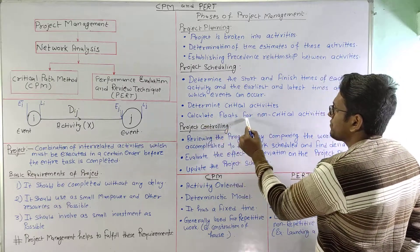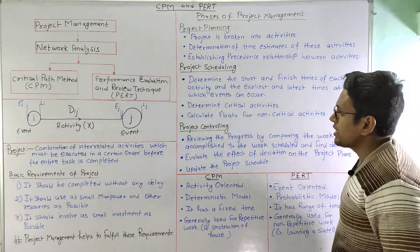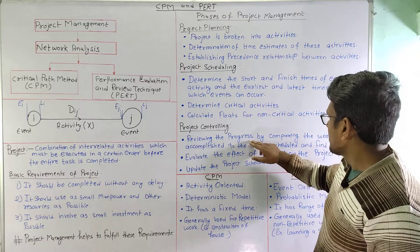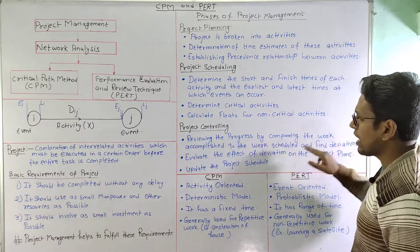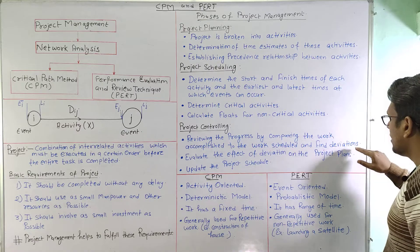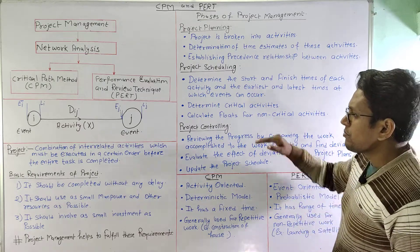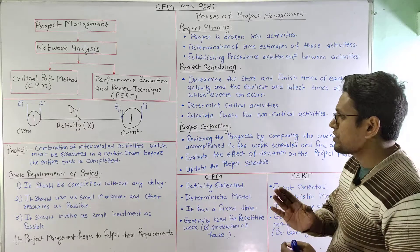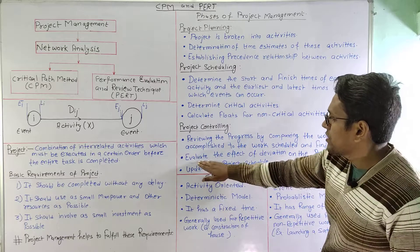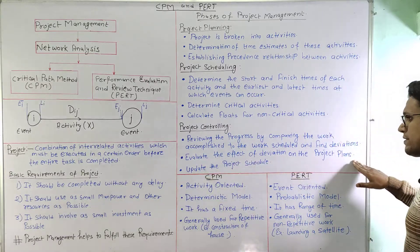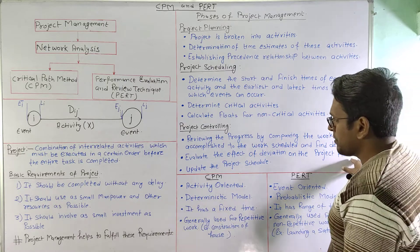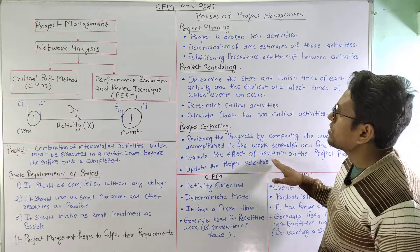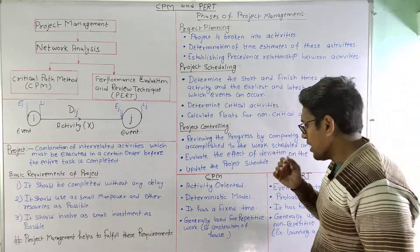Coming to project controlling: we review the actual accomplished work and compare it with the scheduled work to find out deviations. We then evaluate the different aspects of these deviations on the project plans, and finally update the project schedule. These are the three phases of project management.